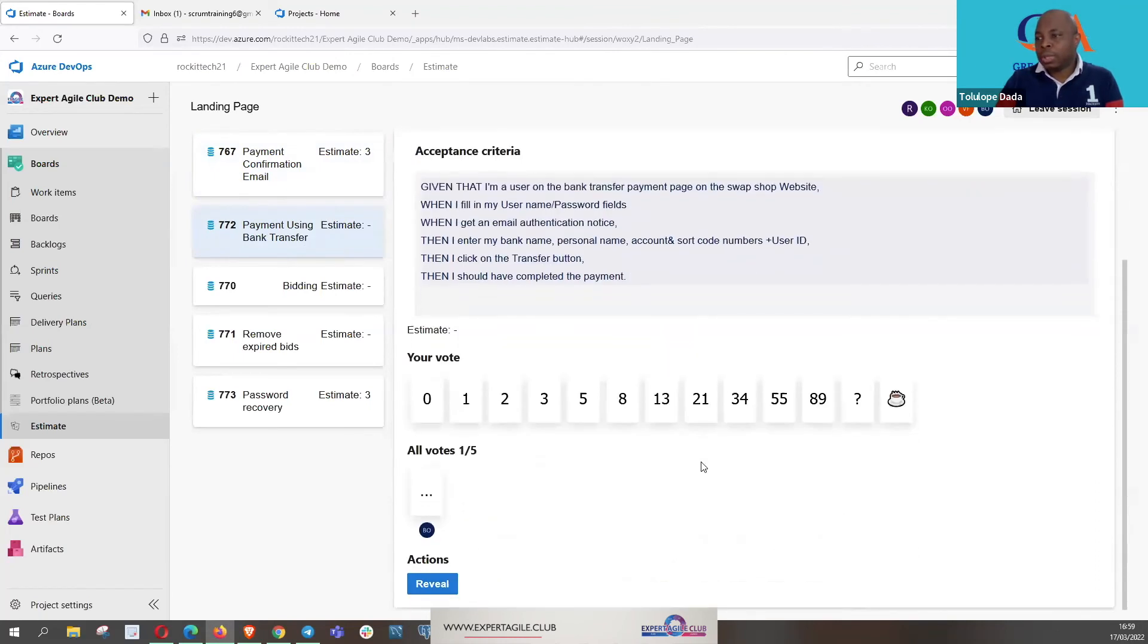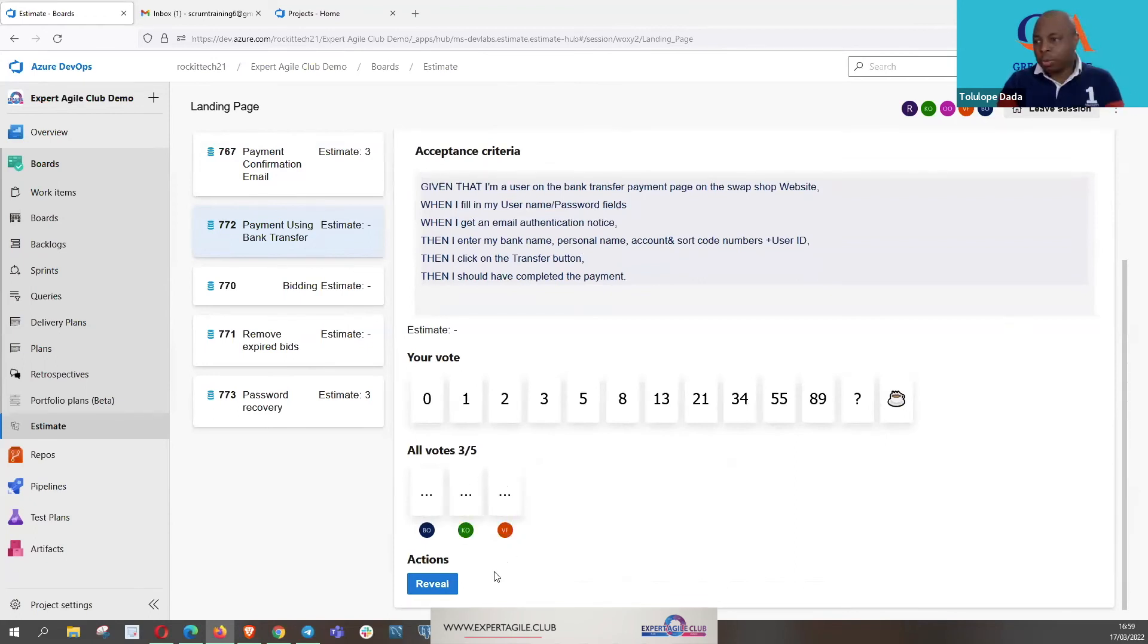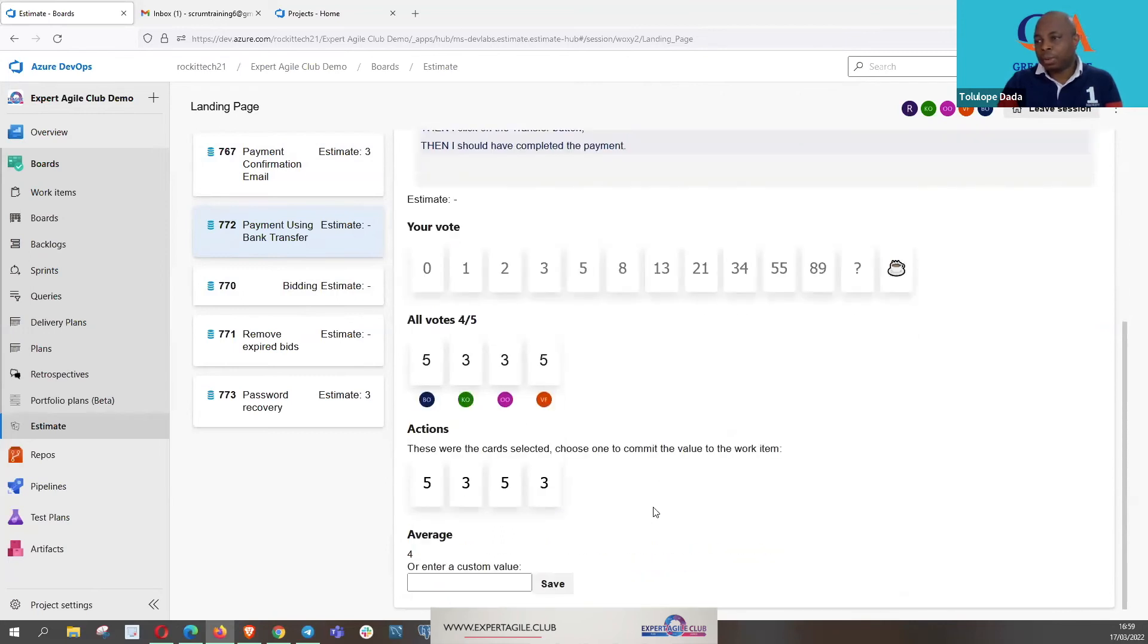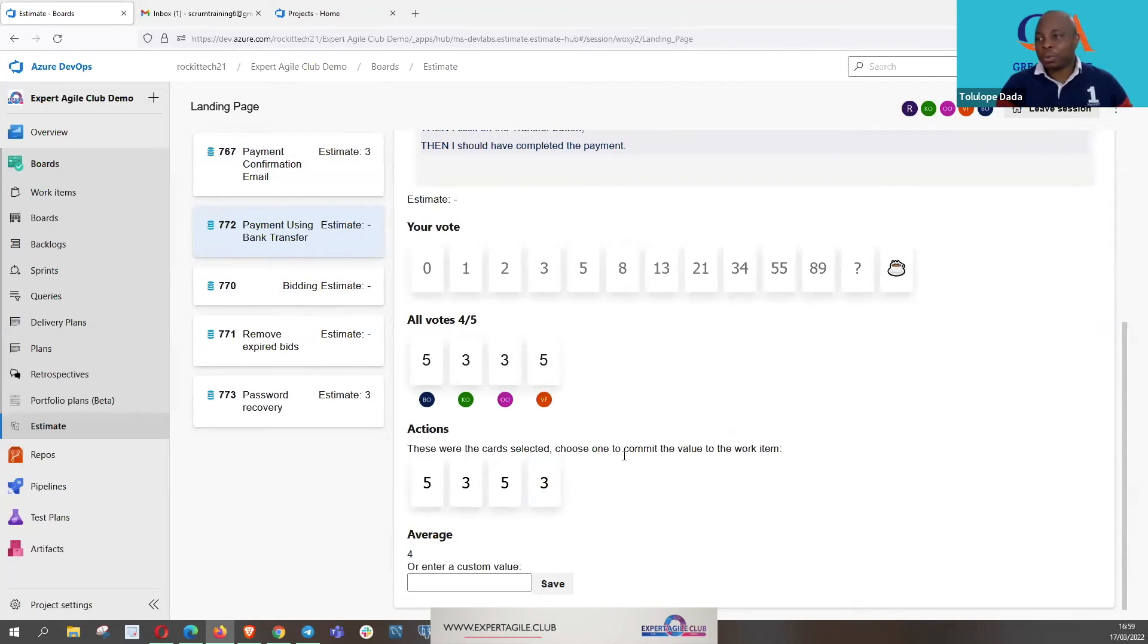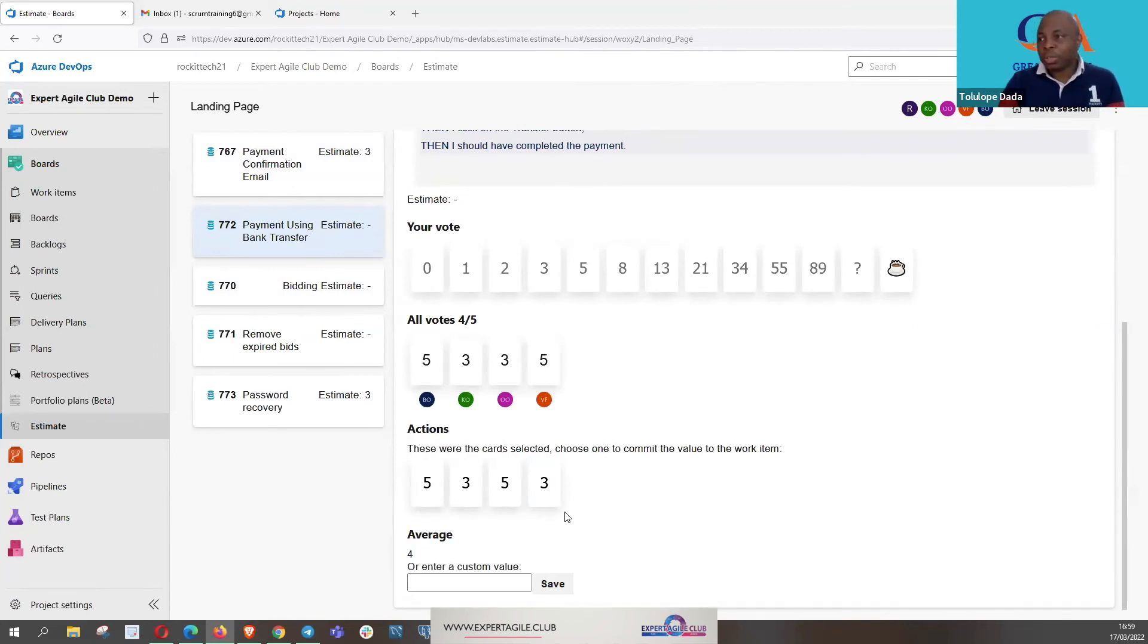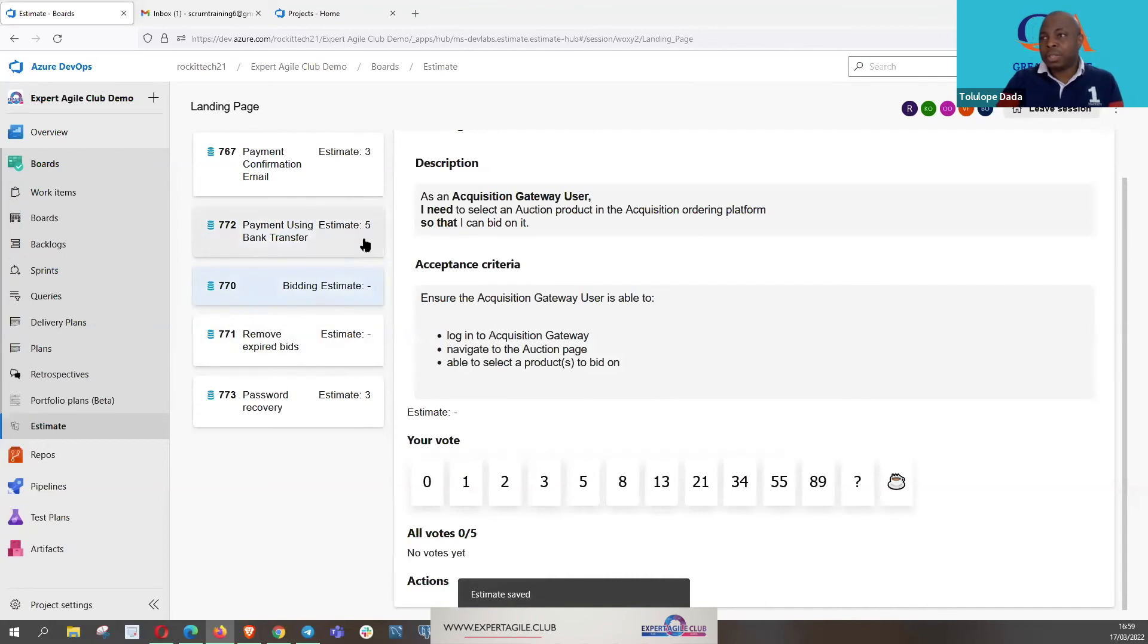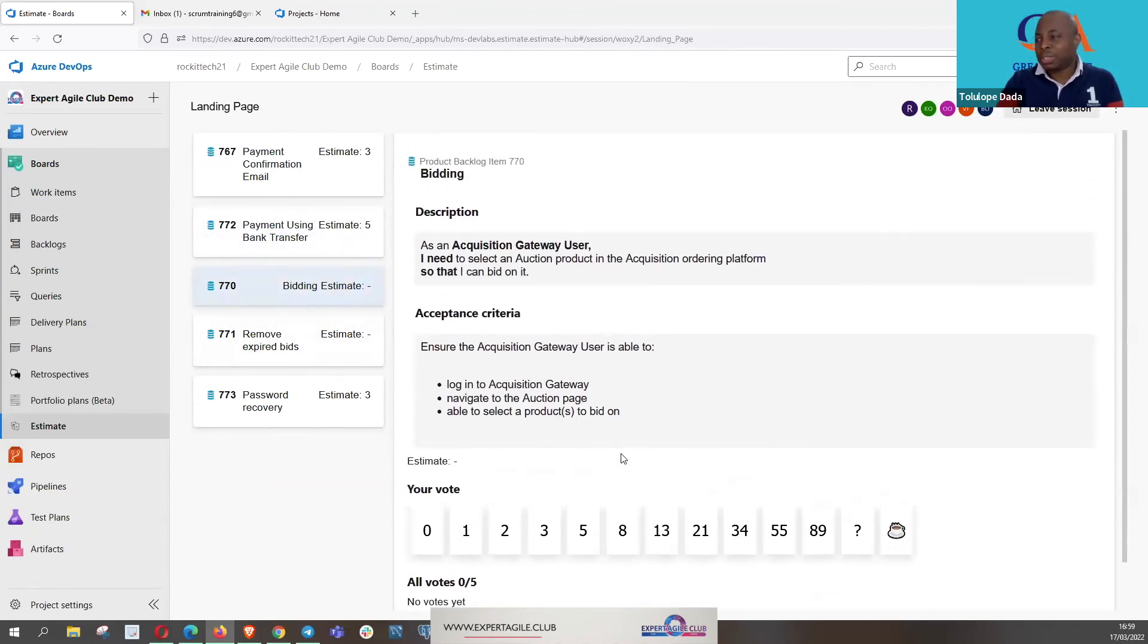The next one, let's see, can we vote for the next one? Thank you, Blessing. We already have three as we estimate there, so we just reveal. So we have 3, 5, 5, 5, 3, 3, 5, 3, 5, 3. Just because of our time, we don't want to go back and forth again to arrive at uniformity, so we just take the upper limit which is five. And it's saved. You can see it there, it goes, it jumps straight to the next one.